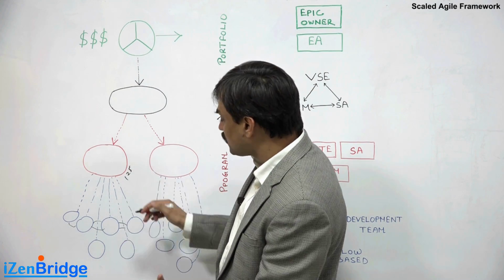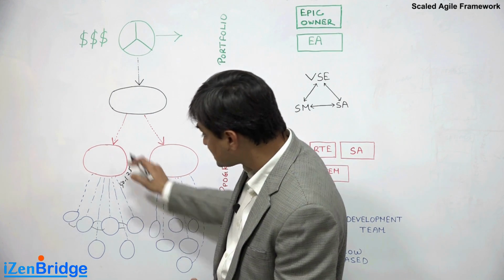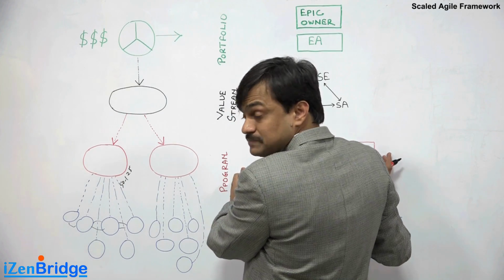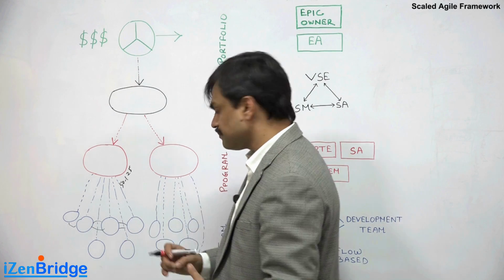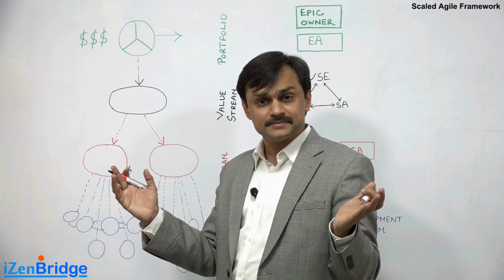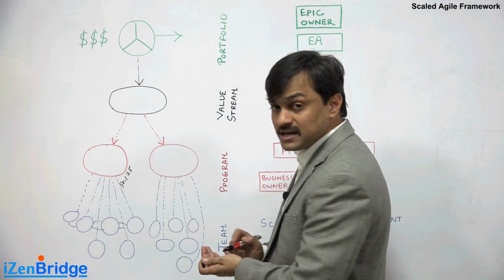In general, such a structure may not make sense until you have a minimum of 50 people. In SAFe, one group guided by these program management people is 125 individuals. Now you may think, what if I need 500 people? If you need 500 people, you create multiple program layers.